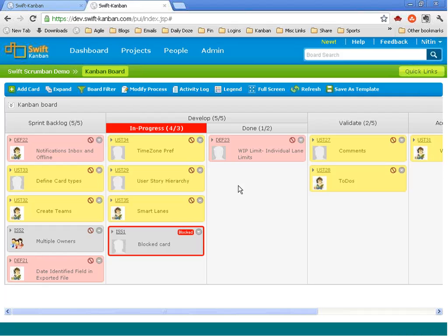The ideal state would have been that you do something, you give it to them, and the next guy, who is a QA guy, can pick it up, validate it, and deliver it to the customer. Right. So that is where the bottleneck can be visualized in the system. The example that you shared is exactly something which highlights the bottleneck with respect to the number of people who can work on that. So it highlights a situation where I may have to look at that. Since it is happening repetitively, it seems that I would have to increase my testers. Right. Exactly. So that is with respect to the number of people or work in progress limit.